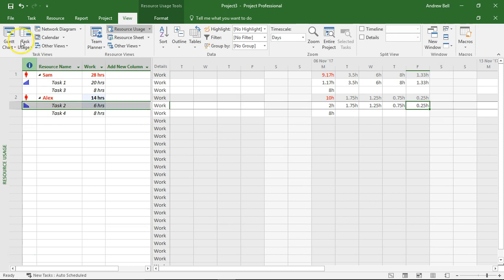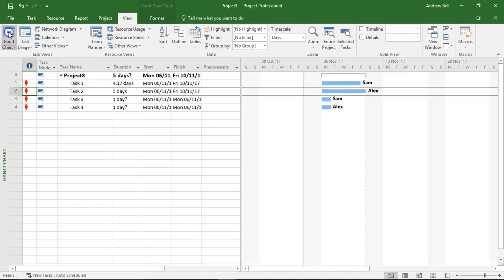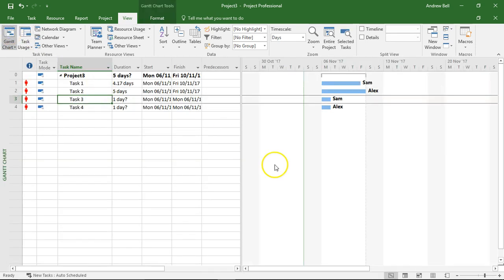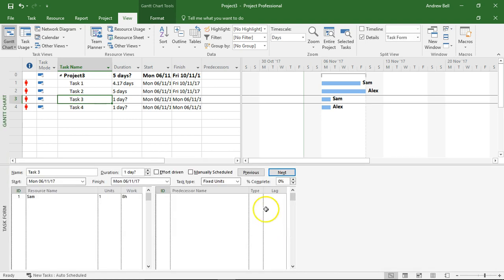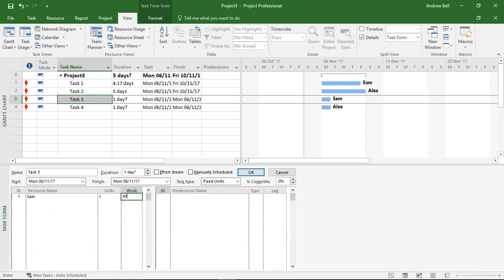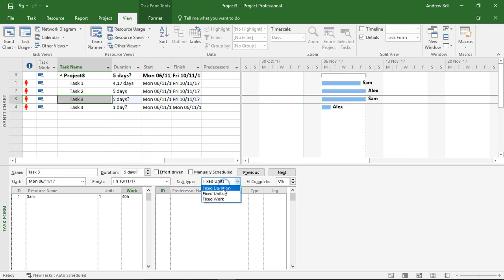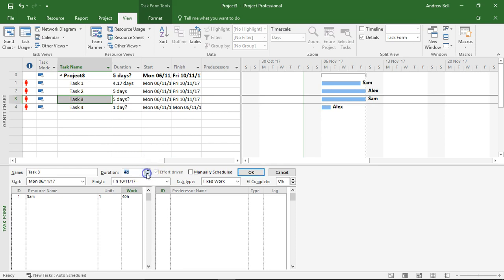I'm now going to go back to the Gantt chart and task three, split the screen. Sam is doing this. I'm going to make this 40 hours of work and I'm going to fix the work at 40 hours and I'm going to explicitly say it's five days.